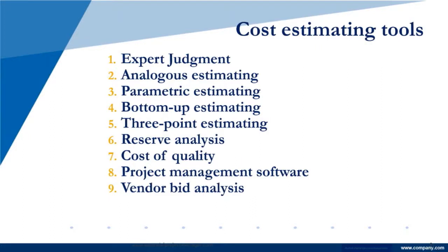We have vendor bid analysis, which we use as a tool to estimate, because when we look at how vendors bid things, we can see how much things are going to cost. If we look at the industry, how much are vendors bidding for certain items, both in terms of how much we have to pay to them for services, for products, etc. And it can be everything from generic, where we get industry standard information that is published on a regular basis. So we know in the last 5 years what people are having to pay for certain services, certain products, computers, whatever. But the vendor bid analysis is here to make sure that we look at what people are paying.